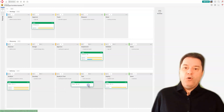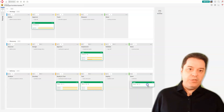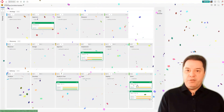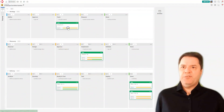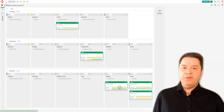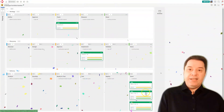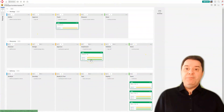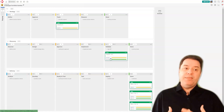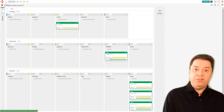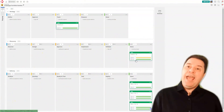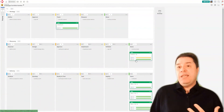As we move the cards across the boards, the cards are going to end up going into the done column — this is your time to celebrate, confetti and all. As the cards continue to get completed, the executives are tracking all this work while we continue to deliver at the delivery level. Once they're all delivered, it sends a clear signal to the discovery team that it's time to pick up the feature card and move it into validate, to make sure they're happy with all the work completed by the delivery team. Once they're happy, they move it to done and celebrate a little bit.